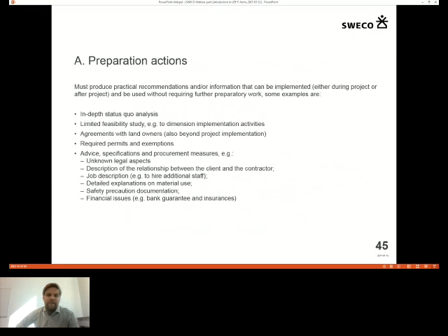You can also make baseline analysis. For example, in our wastewater treatment plant, we would want to make analysis of pharmaceuticals in the water before we start the project to have a baseline to compare from. Of course, it's better to do this status quo analysis before you even write the application, because you will get a stronger application. It's usually not so super expensive, but 60%, or in your case, 85% of co-financing helps so much.